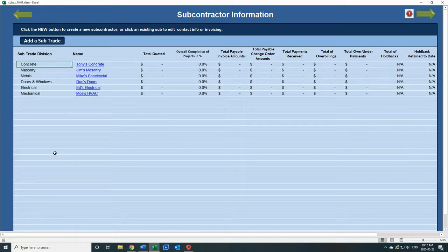So if you've estimated a project and you've got subcontractors already selected with the pricing, once you go into this component, this tool, you can import that particular subcontractor with its price. All that information will be imported right here and populate that page from the estimating.